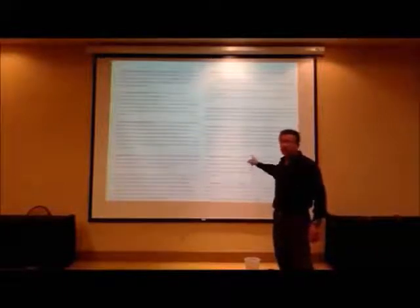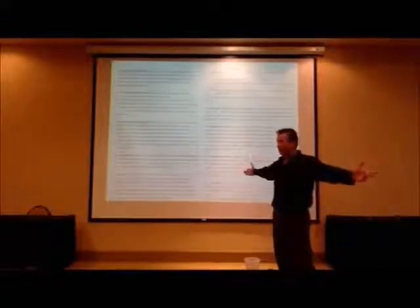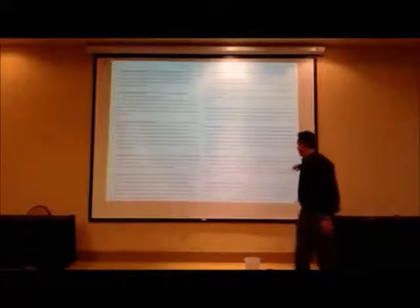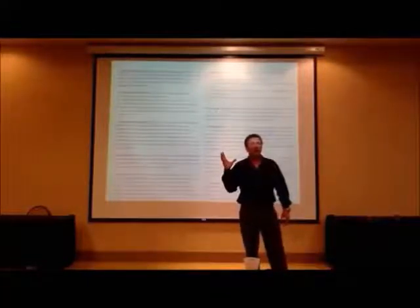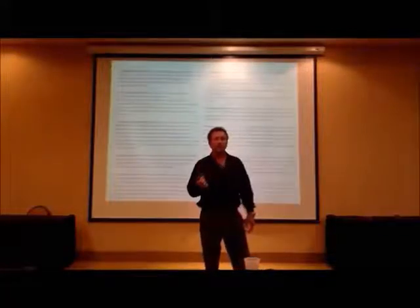Do not use an independent contractor form that doesn't have a drop dead date in it. The contract will take 2 years to end the project, and there's nothing you can do about it. I don't know if you can read this, but basically it says that if they go past a certain day, there is a per day fee that comes off their final draw.